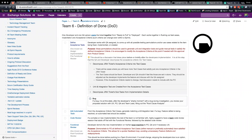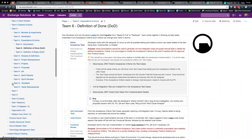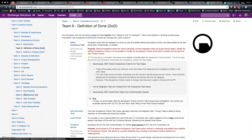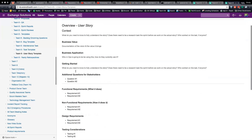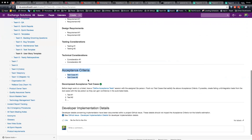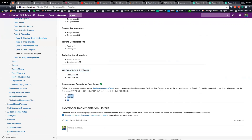What does this look like on a ticket? You guys have kind of seen it — Joseph has been putting together some templates for us to reference. As an example, under a story we have the acceptance criteria, and then we have the decomposed acceptance test cases. Mostly these will be blank until the story is pulled into the sprint and a developer actually pulls a QA in, and they take the acceptance criteria and decompose those into bullet points.